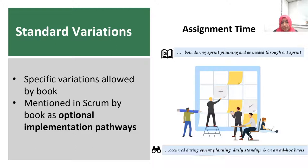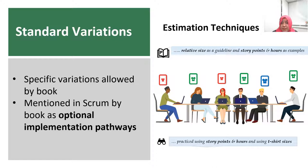A second example of standard variation is estimation technique. The Guide does not describe how to estimate, but the Primer recommends relative size as a guideline, with story points and hours as concrete examples of allowed variations. In practice, we found estimation was done using story points and hours. We also found that teams use t-shirt sizes, which is not mentioned as a specific example in the Primer, but follows the guideline around using a relative size measure.